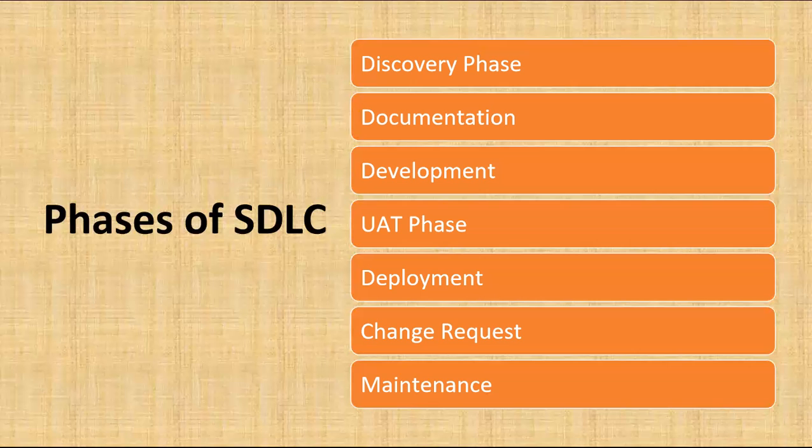Meaning whether this change is required right now, whether this change has been discussed or identified initially, whether this change is documented anywhere, why this change, how the change is impacted, estimate the type of change, like whether it is a minimal, minor, simple change, or a major change, and categorize the change and prioritize the change as per the customer expectations, and communicate this change to the development team and estimate the proper change, and follow accordingly as per the situation, as per the scenario you handle.